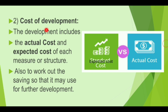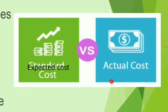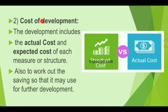The second type in evaluation is cost of development. This includes the actual cost and expected cost of each measure. While performing a development activity, it bears some cost, and sometimes there is variation between actual and expected cost. We have to understand the cost of development and also work out savings so that they may be used for further development.